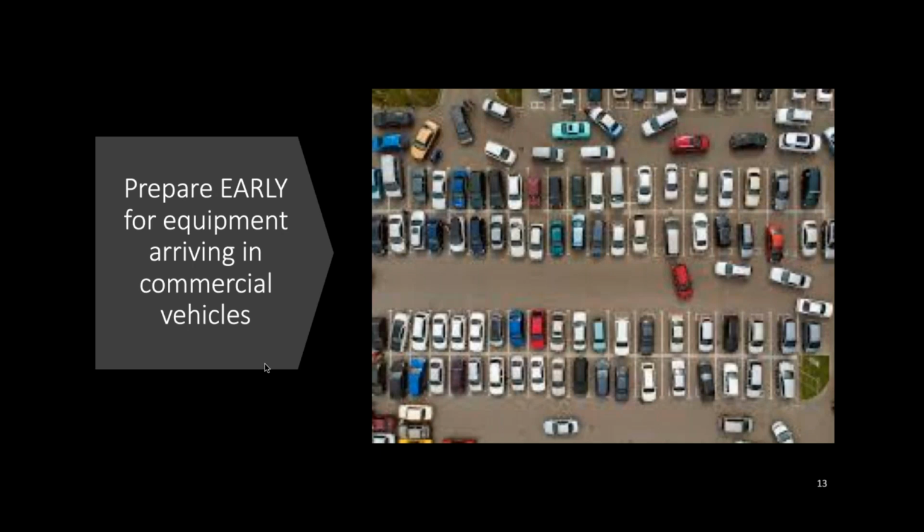The second thing that can happen is you get there and park your truck and get it stationed, and then you get there the next morning and you're blocked in, you're trapped, you can't go anywhere. So be careful on those two things, whether it's at a hotel on the way to the job site or after you get to the job site. Some parking lots are configured on purpose so that big trucks cannot get in them without doing damage. That deters large trailer trucks from coming in. They don't want them in there. Apartments are a good example of that.